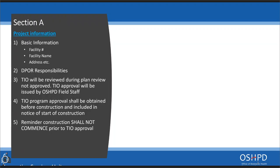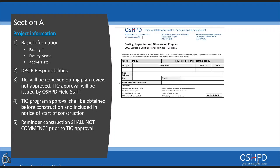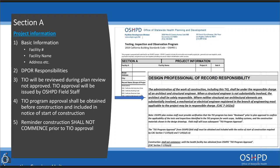Section A provides basic information: facility number, facility name, address, etc. It clearly identifies that it is the DPOR's responsibility to administer the work of construction and maintain the TIO. It notifies the DPOR that the TIO will be reviewed for scope of work during plan review but not approved. The TIO program approval will be issued by OSHPD field staff. Construction shall not commence until written approval of the TIO program is issued by OSHPD.